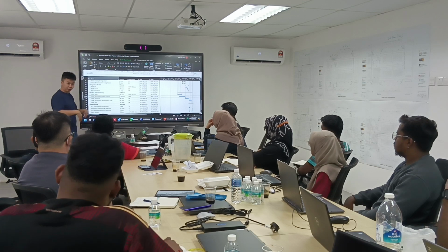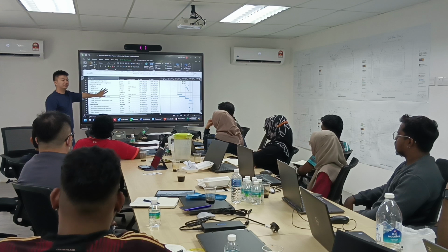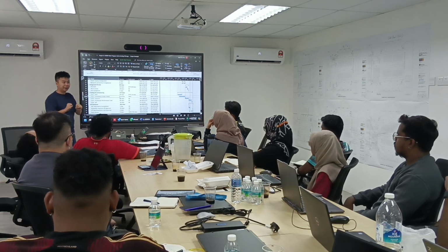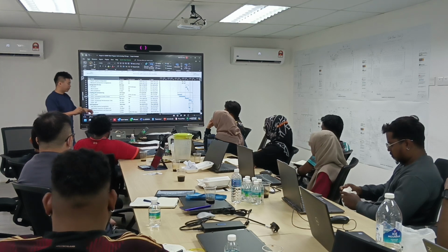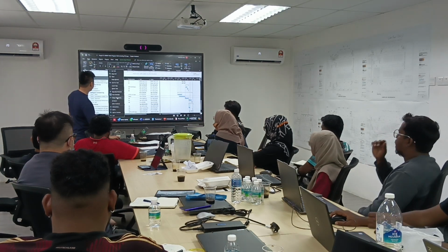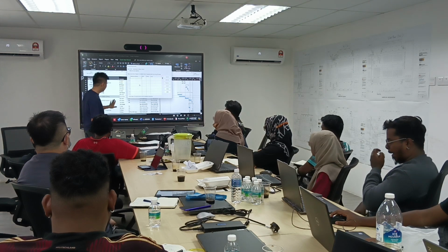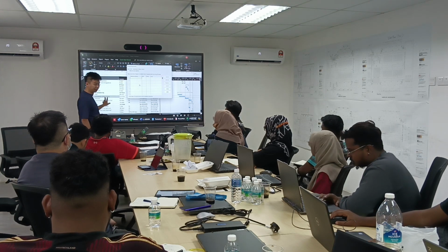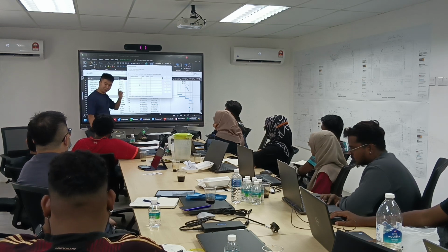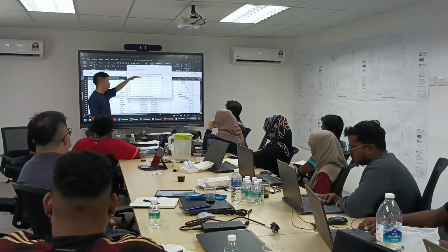If you have a very good planner and a very good project manager, normally I call this the Bible of the project. If you base your work on this, you will never go wrong in terms of timing in your project. Another very useful thing is that the planner will also give you resources. A good planner will tell you, in order to achieve this, let's say I put 130 days for QAQC, how many resources do I need? 10 people? 20 people? How many engineers? They will put all of that here.